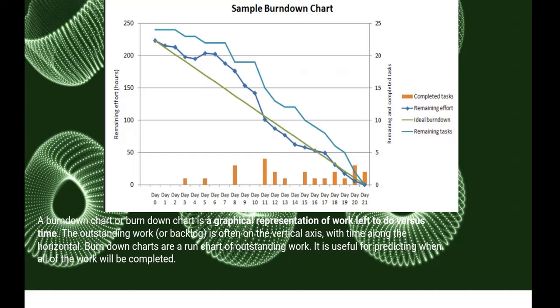Usually we estimate the project using the cost estimation, some kind of cost. We break down the task using the work breakdown structure, and then from there we calculate the cost for each of the work package, right? In the agile, what we do, it's called story point. Story point means they divide the task and then compare the task with some kind of standard.